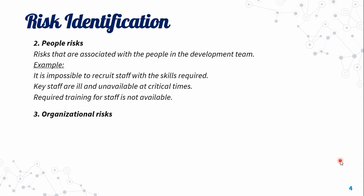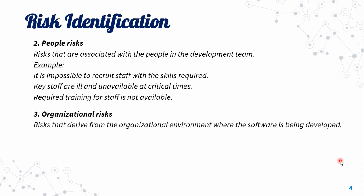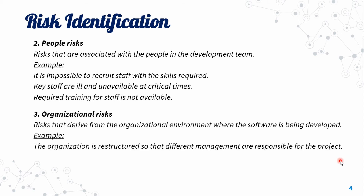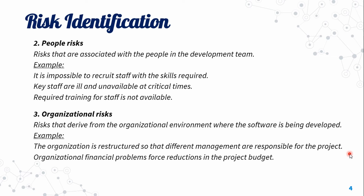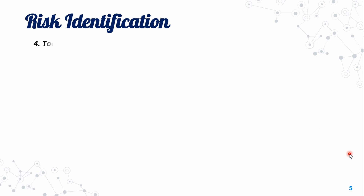Then there are organizational risks — risks that derive from the organizational environment where the software is being developed. For example, the organization is restructured so that different management are responsible for the project, or organizational financial problems force reductions in the project budget.